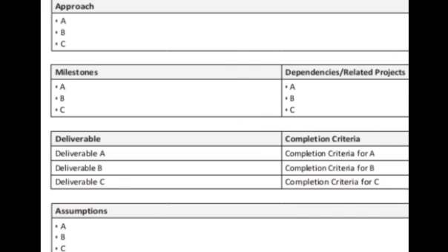No. In the milestone, you have to state when that 7 days will start and when the 7 days will end. For instance, you can say, okay, you are going to deliver the foundation of the house in 1 week. When is that 1 week starting? It's okay, 1st of August to what? 7th of August. So that 1 week that you're going to be delivering the foundation of that house is starting from 1st of August to what? 7th of August. Then the milestone 2, which is raising of the blocks to the roofing level. You said it's going to take 2 weeks, which is 14 days. When is that 2 weeks starting and when is it ending? That's okay.